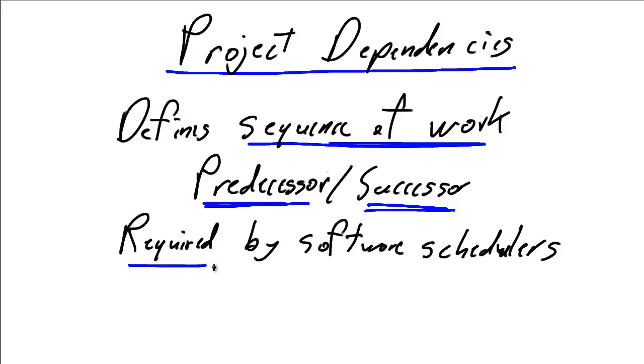But because in today's day and age we're using software to do all of our project scheduling, we absolutely have to define all of the dependencies because the software scheduler doesn't have the common sense that we human beings have. Therefore, we as project managers need to spend a fair amount of work up front defining all of the project dependencies so that our software is going to work successfully.